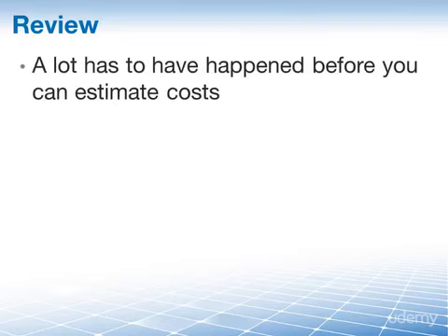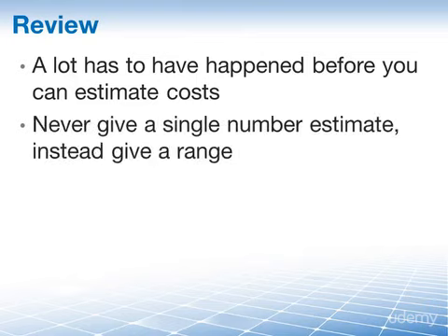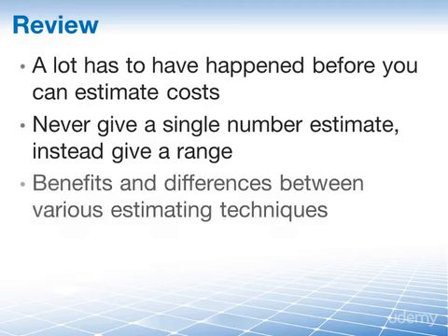Let's review. In estimate cost, a lot has to have happened before you can get to this point. You cannot estimate without a planned scope. You cannot estimate without some understanding of the resources that are involved. You should never give a single number for a cost estimate. Instead, give a range. The size of the range depends on your level of confidence and method used in estimating costs. You should also know the benefits and differences between the various estimating techniques like parametric estimating and bottom-up estimating or analogous estimating.